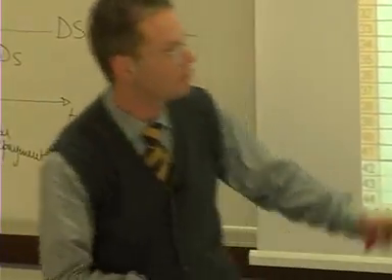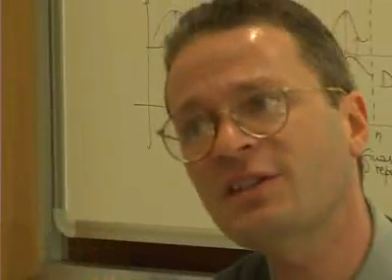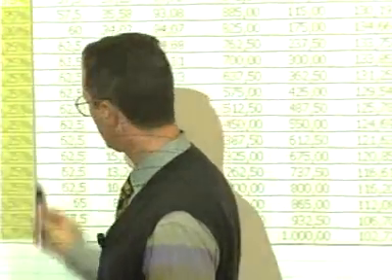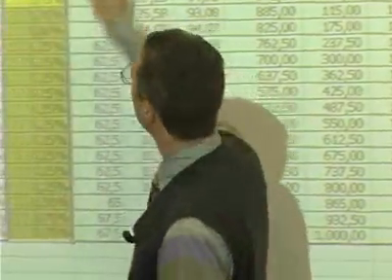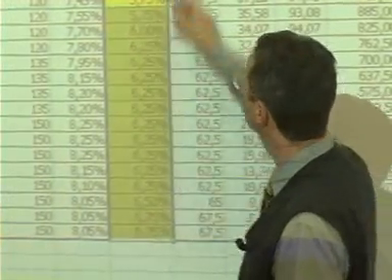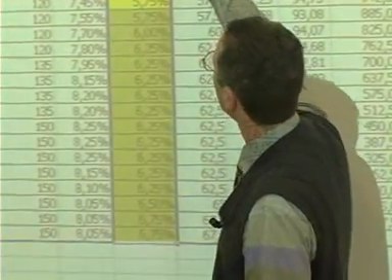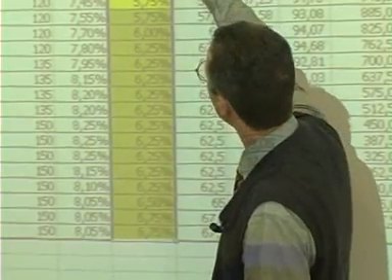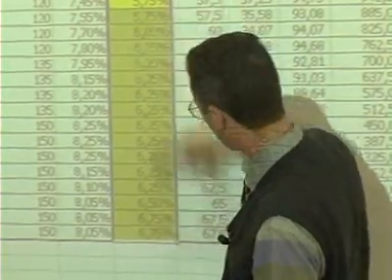Again, this is the column of your interest. Obviously, you can see that the total amount, the sum, is 100, and it is obvious. You have to amortize completely the loan. But the interesting thing here is that I moved the capital repayment from the first 3 years to the last 3 years, increasing the amount to 6.50 in semester 14, 6.75 in semester 15, and 6.75 in semester 16.